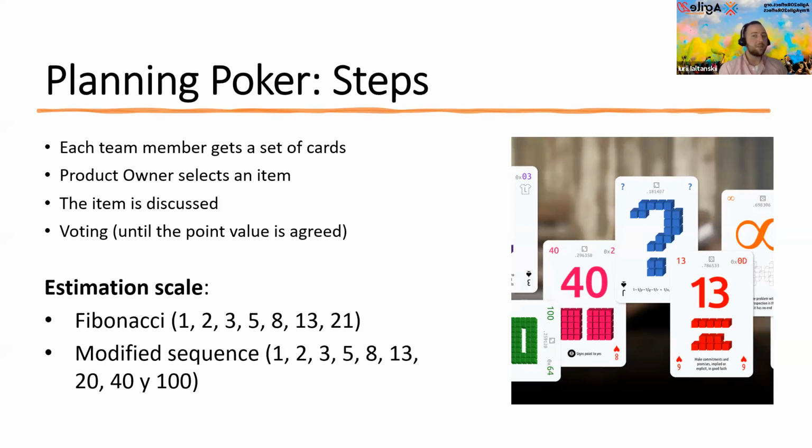But it could be the case that the item is prioritized and has high priority, and most likely the team should say, okay, we're going to assign John, who's our senior developer, to work on this, to complete it fast and in a timely fashion, because we need it done fast, otherwise we won't be able to show it on the sprint review, etc. So the team should decide, and this is the challenge.